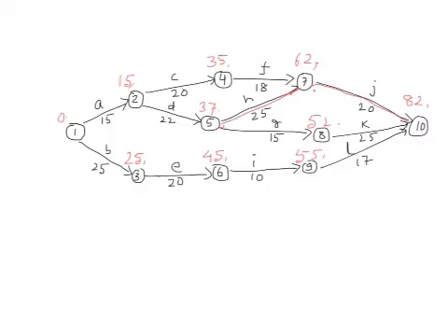Then this 37 on node 5, since only one arrow is ending there, so obviously D is on the critical path. And for node 2, again 15, there is only one. It means that activity A, D, then H and J, these four activities form the critical path. Our critical path here is A, D, H and J.